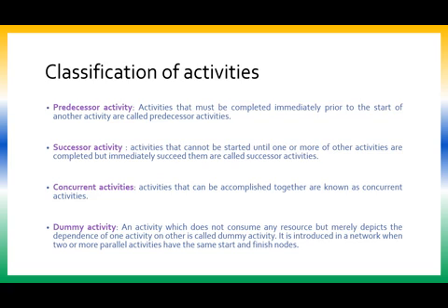An activity which does not consume any resource but merely depicts the dependence of one activity on the other is called a dummy activity. See, this is actually not an activity at all. If it has to be an activity, it has to consume time and it has to consume resources.